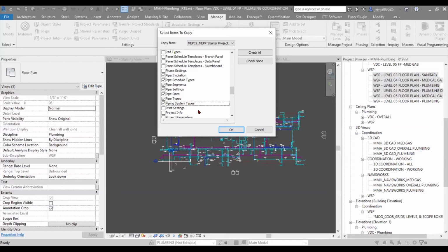And if something happens in the field, especially, I had a project where we didn't have all the chases lined up going up the building. I mean, this is a 10-story building. So that stopped the design, and we had to go back and fix that. Another scenario, we had footings coming in on a Southern Florida project, and the footings got larger overnight. All our underground had to be redone in literally a couple of hours.